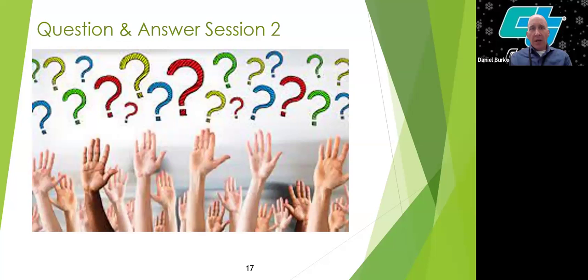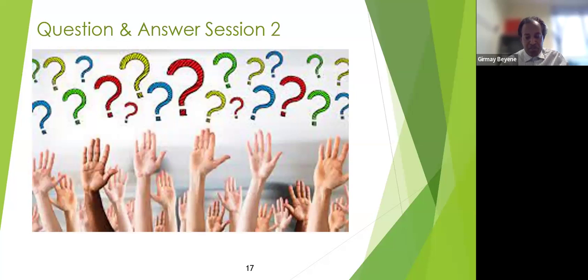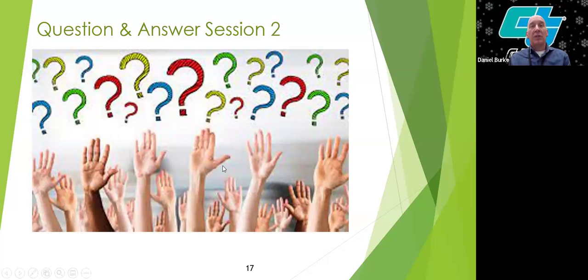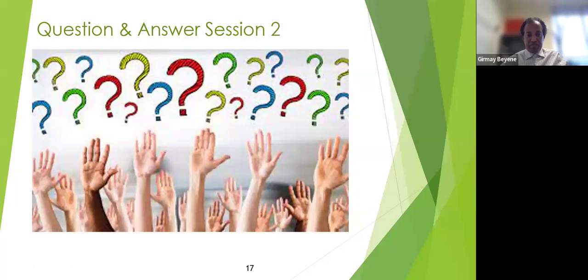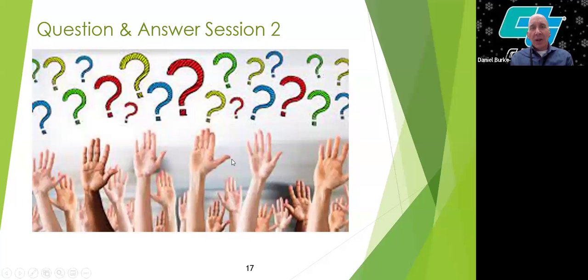Hey, winding down here, are there any LAPM requirements on the frequency of resident engineer daily reports? No, right now, based on the LAPM, the daily report for the inspector is daily. For the RE, it could be daily or weekly. We leave that up to the discretion of the agency, but for the inspector I want to stress it is daily. Excellent. So inspector daily, resident engineer daily or weekly as needed. Okay. Thank you.